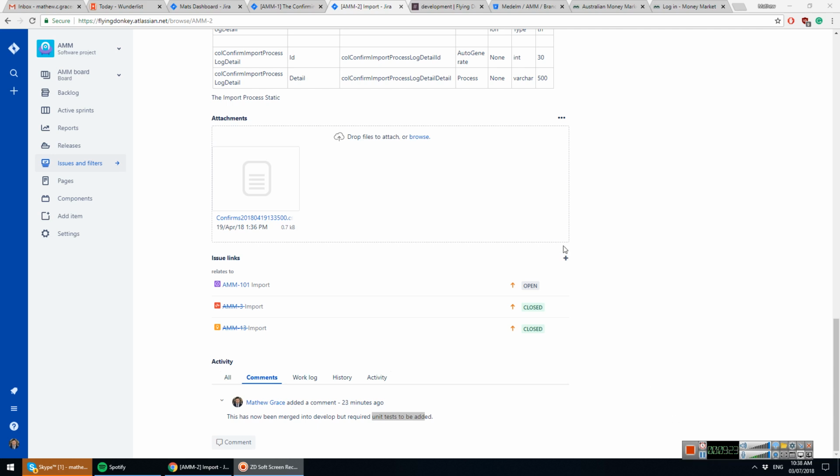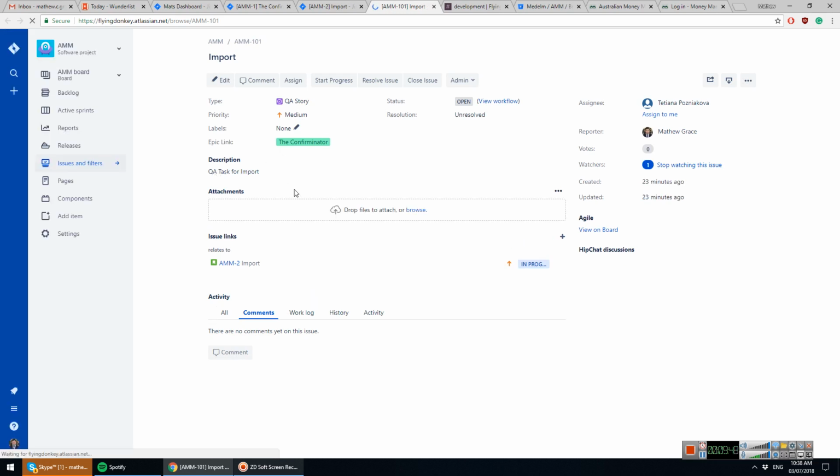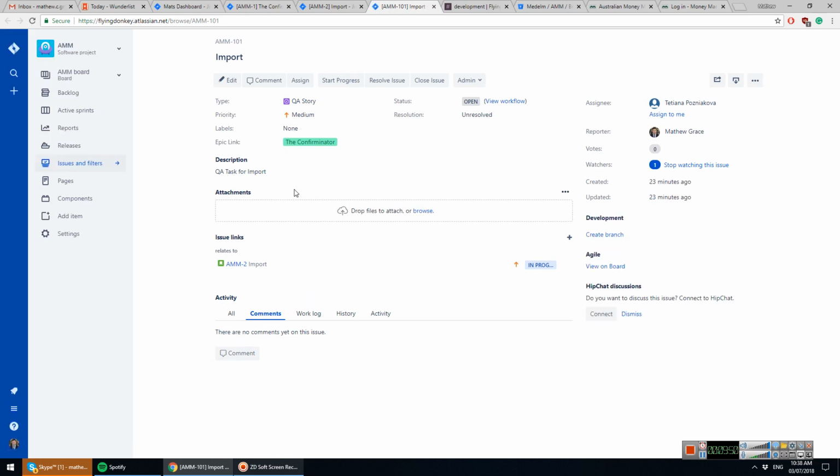So once that's all good and you're happy with it, once you've completed the testing, there will be a QA task for every single task. So you'll do some manual testing just to check it's all right and looks okay. And then the QA guys are going to set up automatic testing. For some of these really simple tasks, there's not going to be a lot of manual testing required because the testers know what they're doing. But the idea being that we'll also be setting up a QA ticket to effectively say what tasks there are. I haven't written any descriptions here, but I would expect that a set of descriptions would go in here.